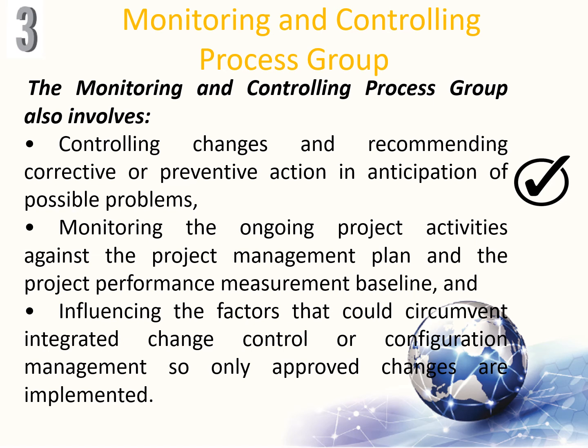In multi-phase projects, the monitoring and controlling process group coordinates project phases in order to implement corrective or preventive action to bring the project into compliance with the project management plan. This review can result in recommended and approved updates to the project management plan. For example, a missed activity finish date may require adjustment and trade-offs between budget and schedule objectives. In order to reduce or control overhead, management by exception procedures and other techniques can be appropriately considered.